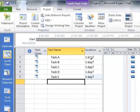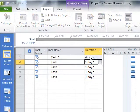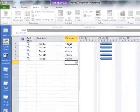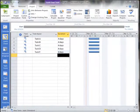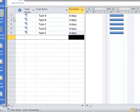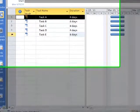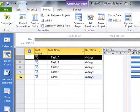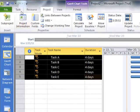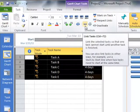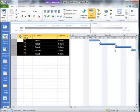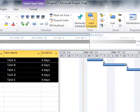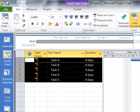Let's make each of these take four days of time. What we're going to do now is link these tasks together. If you're setting up simple Finish to Start Relationships, we can select a range of tasks, say one through five, and if we're going to link them sequentially, go up under Task and click on this Link button. That's going to link the tasks together for us sequentially from the top of the list to the bottom of the list.